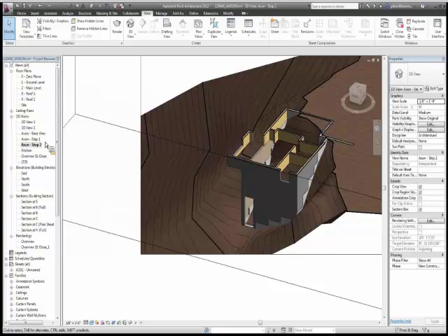Maybe all your 000s are the foundation elements, all your 100s are the first floor elements, all the 200s are the second level elements. Whatever scheme it is, it's going to make the most sense to you. We're going to come up with a sequential scheme for numbering these things that'll let us introduce them in that numeric order. The idea is we assign this numeric order, and then we'll have things come on the stage in that numeric order. So you got the general idea of that? Does that sound okay?